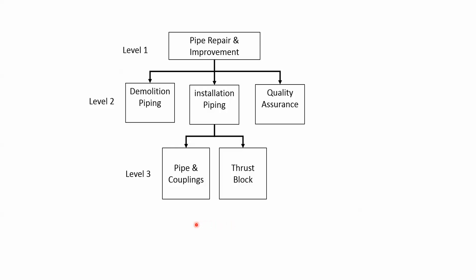On the screen we have our demonstration WBS. This is a WBS for a pipe repair and improvement project listed on level 1. As you can see on the WBS, the project has three major WBS elements or deliverables: Demolition Piping, Installation Piping, and Quality Assurance.